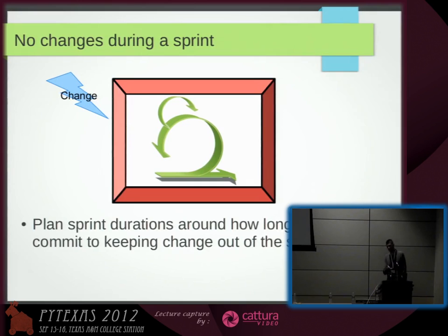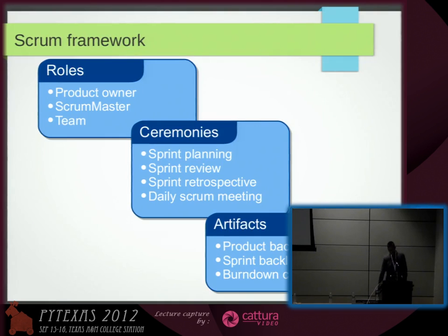The other things that are not mentioned here but are affecting this is that it also depends on what kind of technology you are using and what level of testing is required. So there are certain things that you cannot do in 2 weeks, and going towards shorter sprints also requires more activity on the product owner side, because they have to prepare the backlog in a way that the granularity of the features or requirements is such that they can be done in 2 weeks.